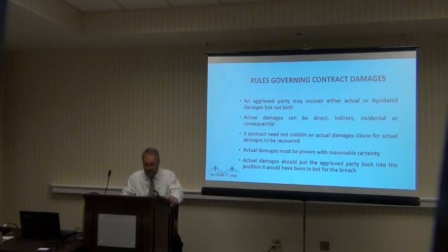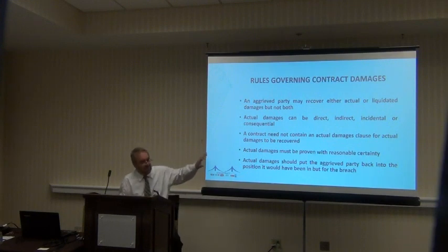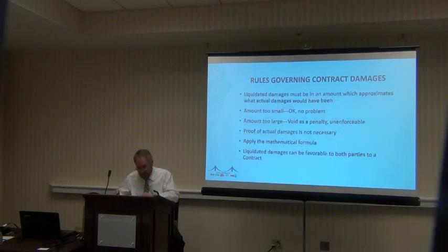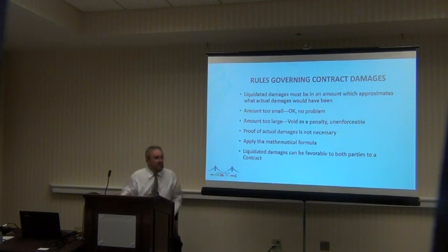But anyway, now let's talk about liquidated damages. We've been focusing, as a backdrop, on what liquidated damages are by looking at the rules on actual damages. Now let's look at what liquidated damages is. The legal rule for enforceability, and there's a lot of latitude on this, I don't mean to say this is like the eye of a needle trying to get a camel to pass through it. But the legal rule is liquidated damages have to be calculated in an amount reasonably designed to approximate what the actual damages would have been had there not been a liquidated damage clause or an amount set forth in the contract.